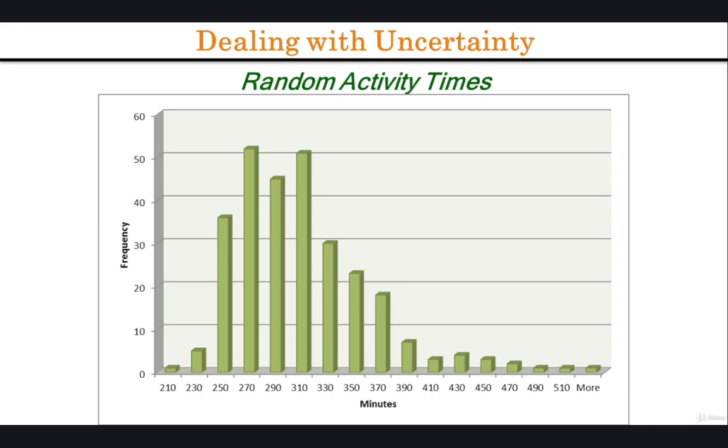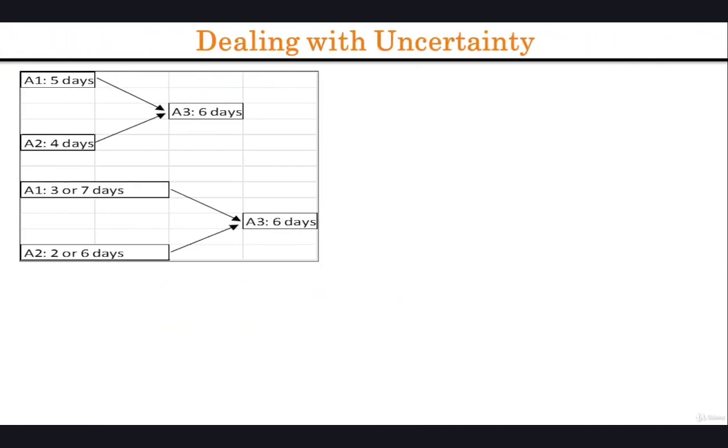When facing uncertainty in the activity time durations, it is important to understand that uncertainty in the activity duration is a bad thing because it, on average, will lead to a later completion time of the project. It is a misconception that uncertainties in activity times will cancel each other out. When some activities are completed early and others are completed late, the overall impact on the project duration is almost always undesirable. To see this, consider the simple project graph displayed in this figure.